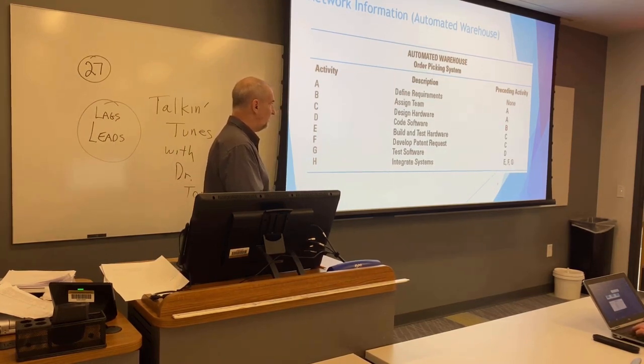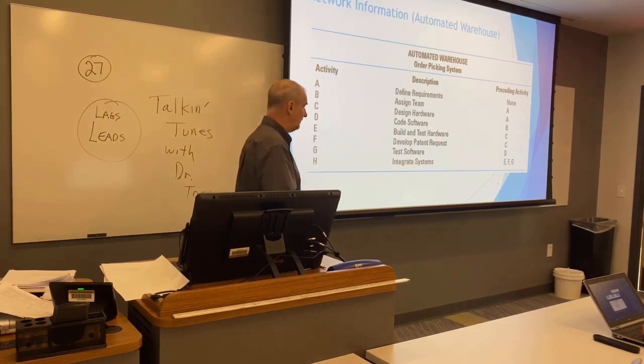Then you're going to code your software based on these two things. Then you're going to build and test hardware, develop patent request. That's based on the design the hardware, right? And then you're going to test the software, which is based on coding the software. Then you're going to integrate these three things.